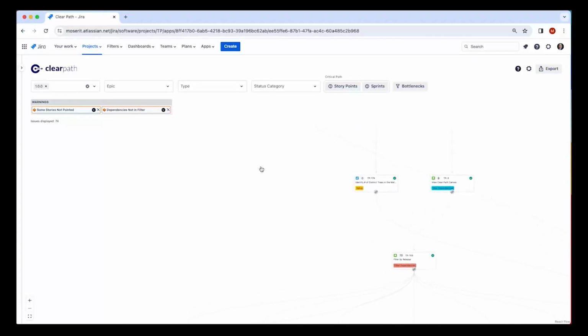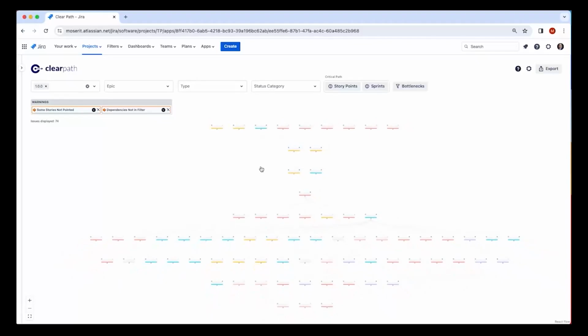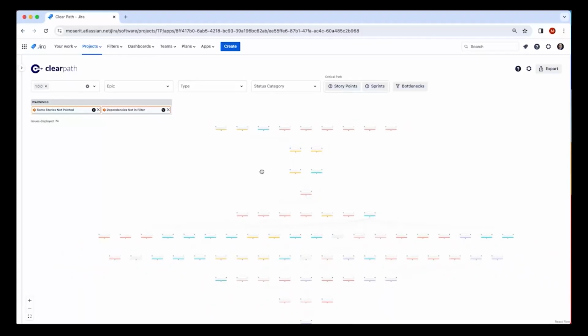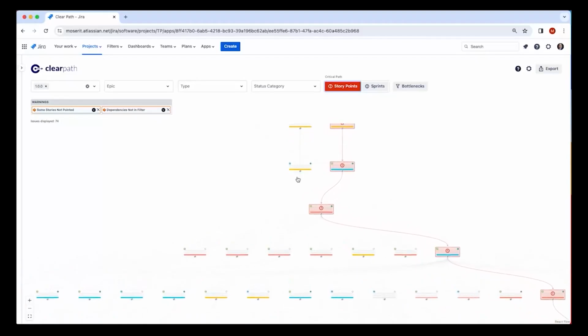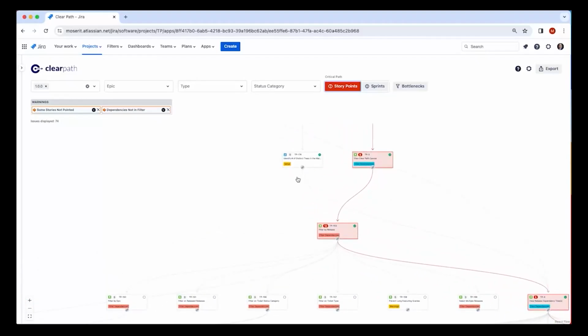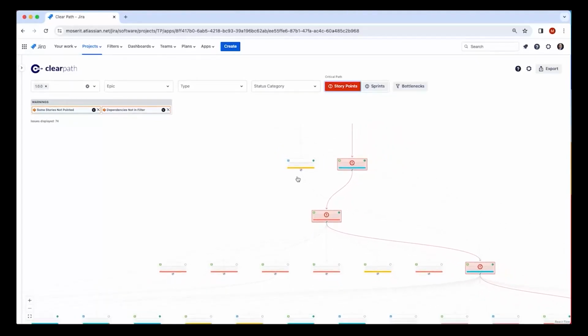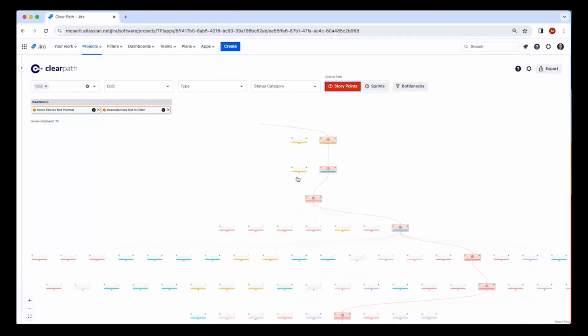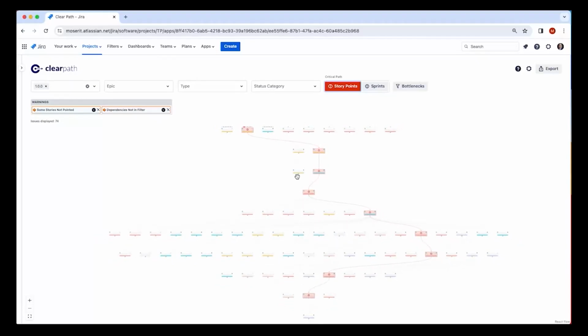If you're concerned about staying on schedule or managing your technical risk, this is a great time to look at your critical path. When I select it here, you'll see the tickets on the critical path are not just highlighted in red, but the ticket border is changed and an icon is placed on the card. Those changes are part of accessibility improvements by giving an alternative indication of critical path tickets than just a color change. Getting a border change and an icon.